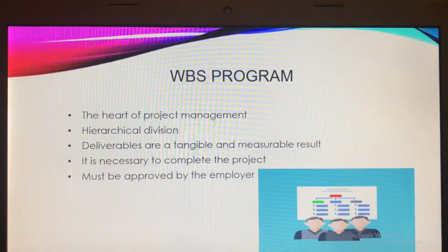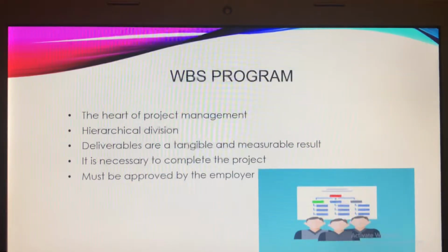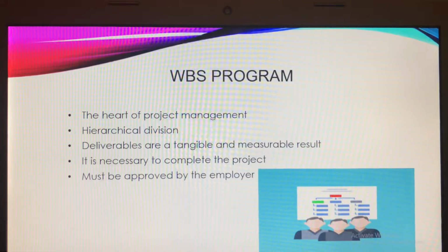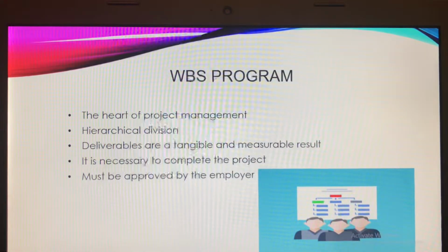WBS is used to such an extent in project environments that it can be said that WBS is the heart of project management. In the WBS project, there is a hierarchical division of the deliverable, in which the deliverables are a tangible and measurable result that is necessary to complete the project and must be approved by the employer.